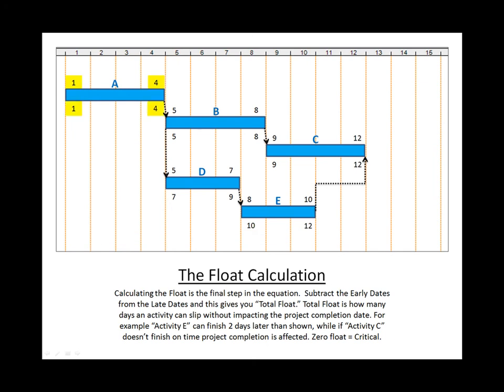Total float is how many days an activity can slip without impacting the finish date. For example, activity E can finish two days later than shown, while if activity C doesn't finish on time, project completion is affected. Zero float equals critical.